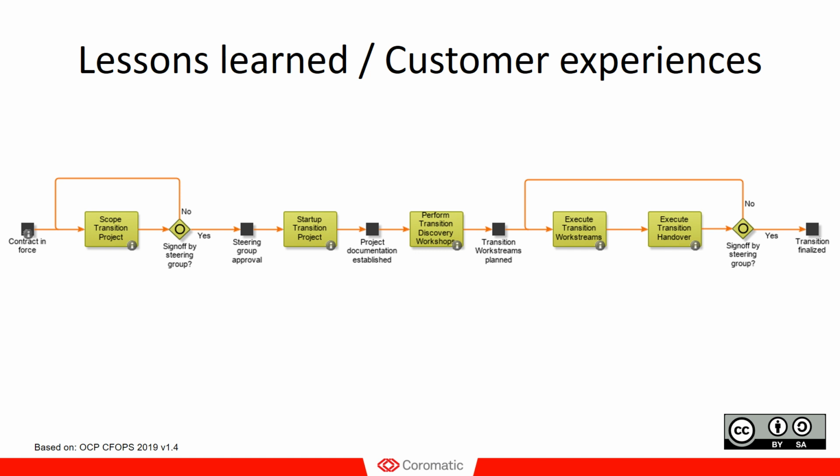So professional project management is required, and that leads to the first step of the specific transition contents, if you like, of the project, and that is to perform discovery workshops. It's a quick way of looking at what do we have and what do we need to have, and then based on that gap analysis, identify what are the most critical or the highest risk areas that we need to really work on here, and which ones are important but less critical, and group those.